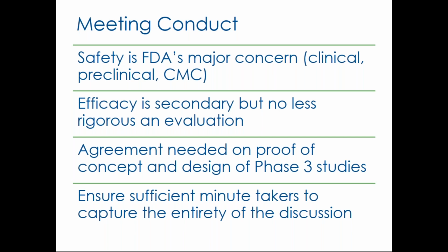We endeavor to get a verbatim transcript of what happens at the meeting, identifying every question that FDA asks and who the FDA reviewer is that's asking a question, because it makes a big difference whether the question is coming from the medical reviewer or the non-clinical pharm tox reviewer. And that puts things in context. And once you have a verbatim transcript, it's much easier to assemble your minutes to go back to FDA.